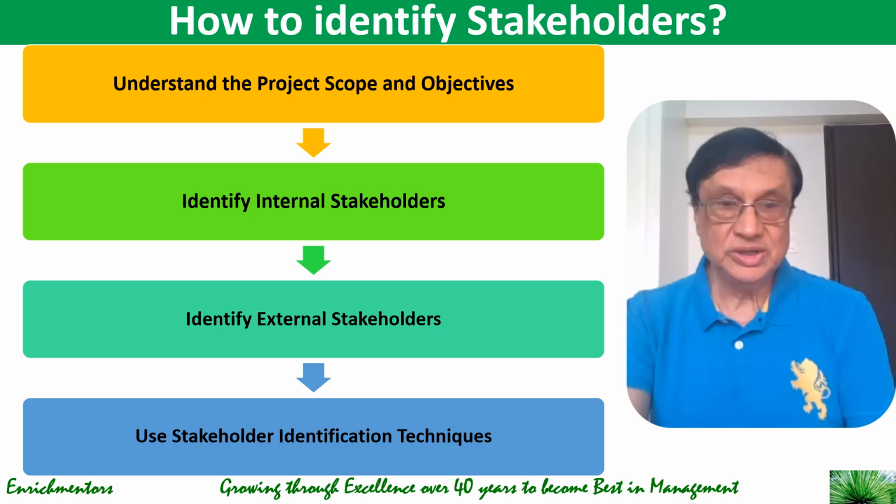And also you can use document analysis to review organization charts, previous project documents, contracts and agreements to identify potential stakeholders. So it's all to identify potential stakeholders that you can use these identification techniques.